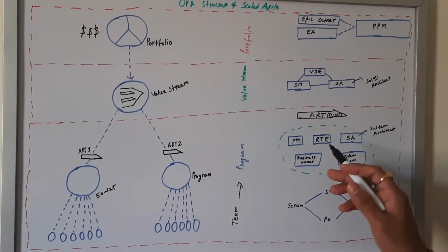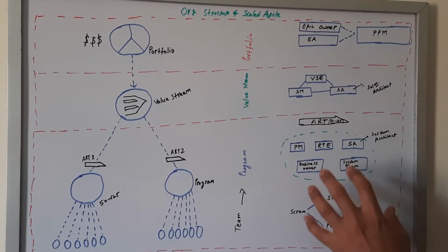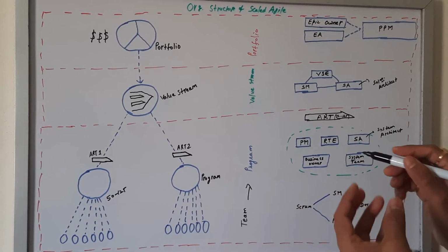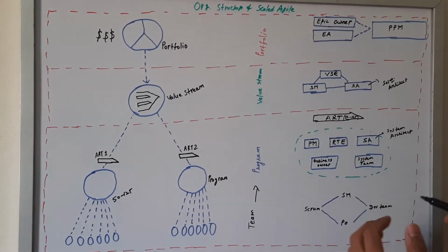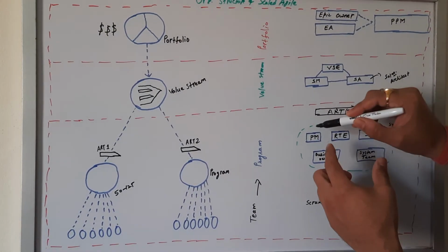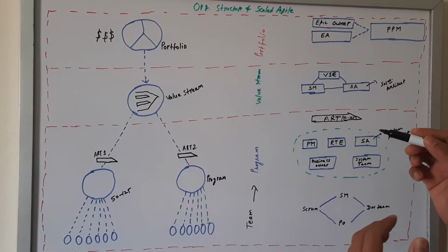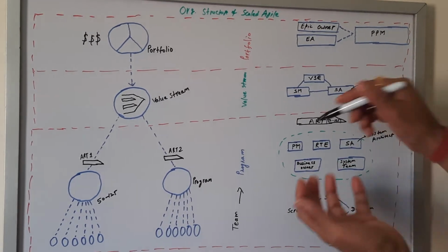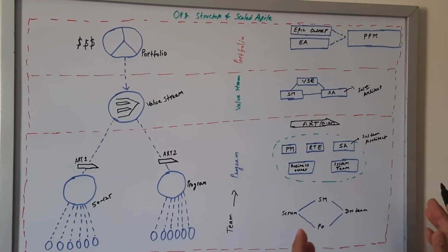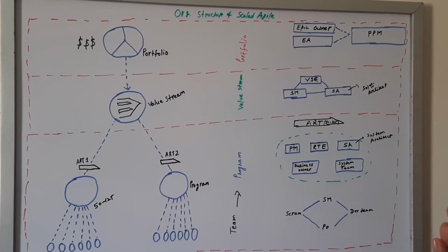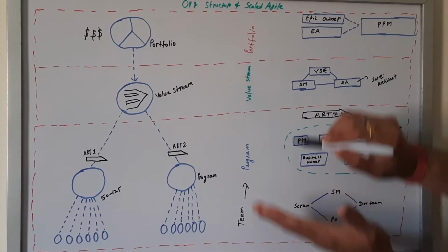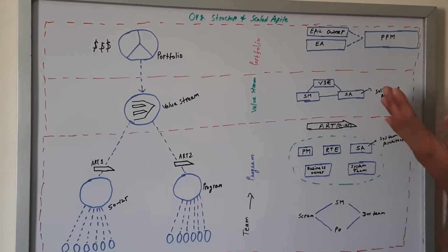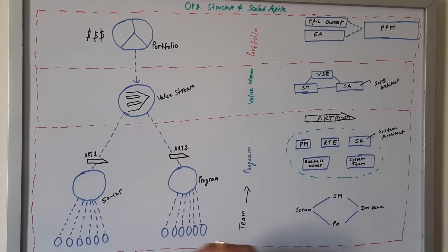Business Owner is one more role defined at the program level. What will the Business Owner actually do? They are the key stakeholders, and they provide the business-related input at the program level. From those inputs, product management will define the high-value or high-priority features, coordinate with the product owner, and deliver them at the program level. So till now, from the team level we have scaled up to the program level when our team size increases to more than 5 to 6 teams.